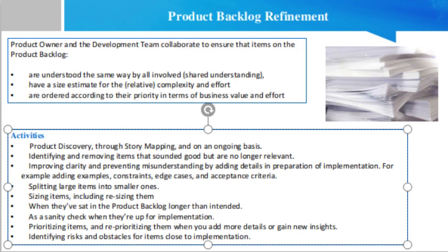How long should backlog refinement take? The Scrum guide doesn't say anything about how much time backlog refinement should take. It only specifies that it usually does not take more than 10% of the capacity of the development team. The product owner is not part of the development team and can invest as much time as necessary and can enlist the help of other members of the Scrum team. Turning a story into a spike is a way to make this explicit and keep it from eating into that 10%.